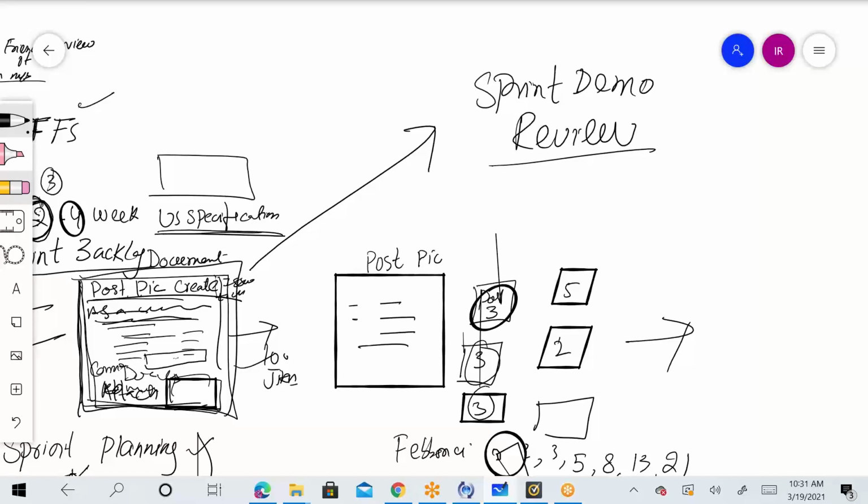Now, it doesn't mean that you should be applying those changes in the coming sprint. If the changes they have requested are not critical, you can always do them later on. But if those changes are critical, then you need to do them in the coming sprint. Make sure you facilitate your user by doing those changes.